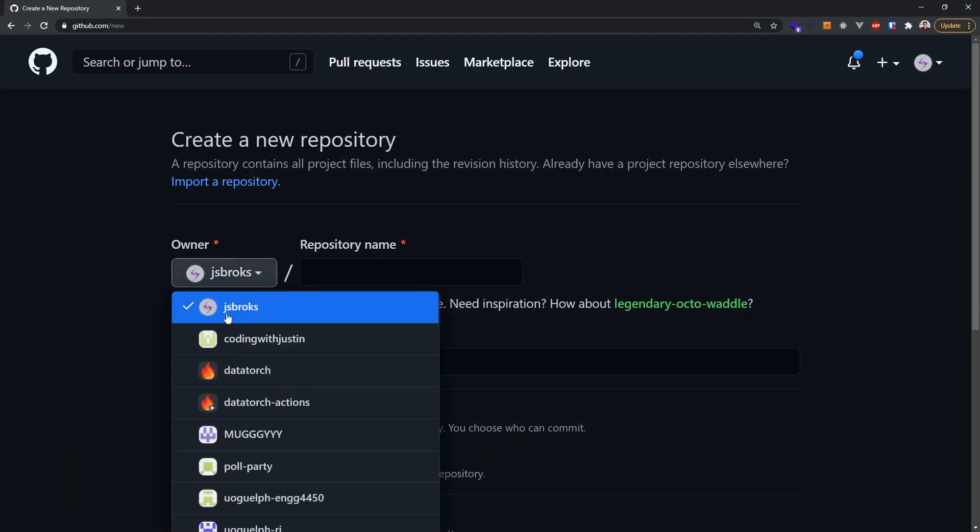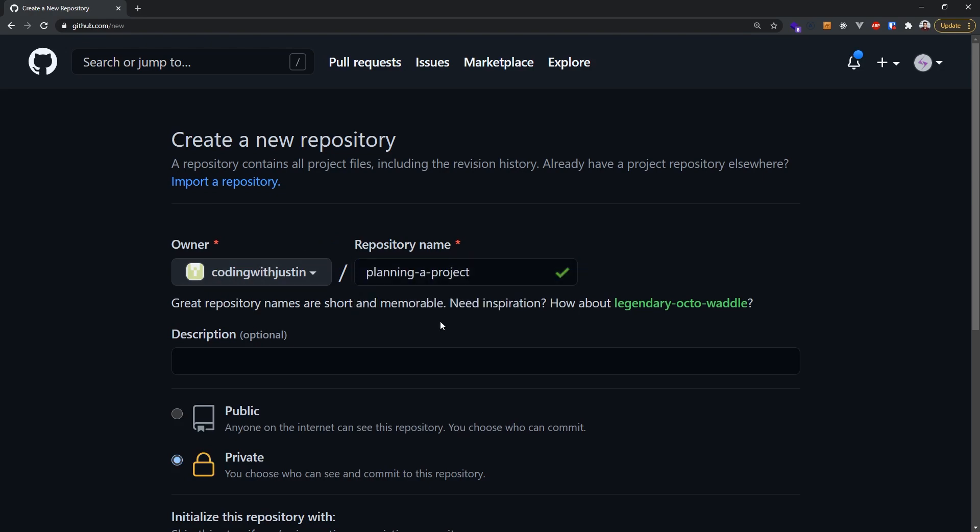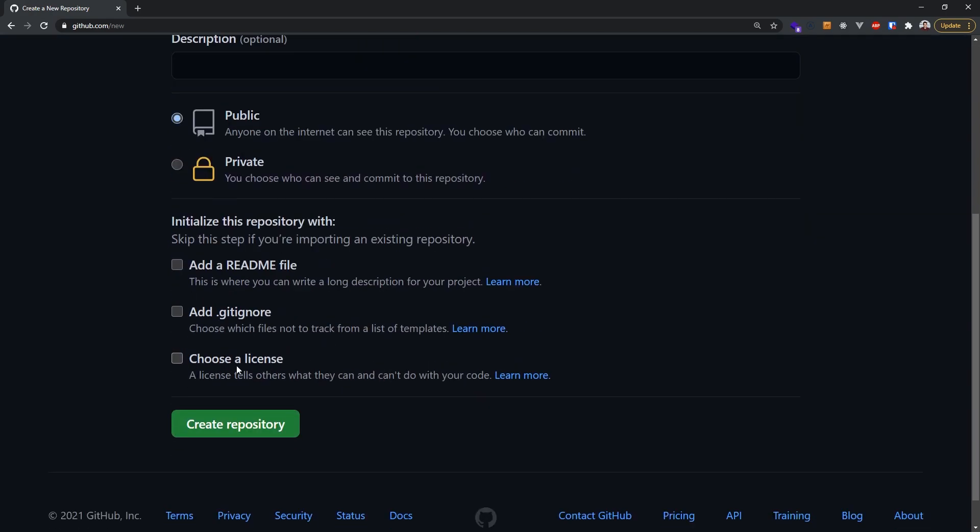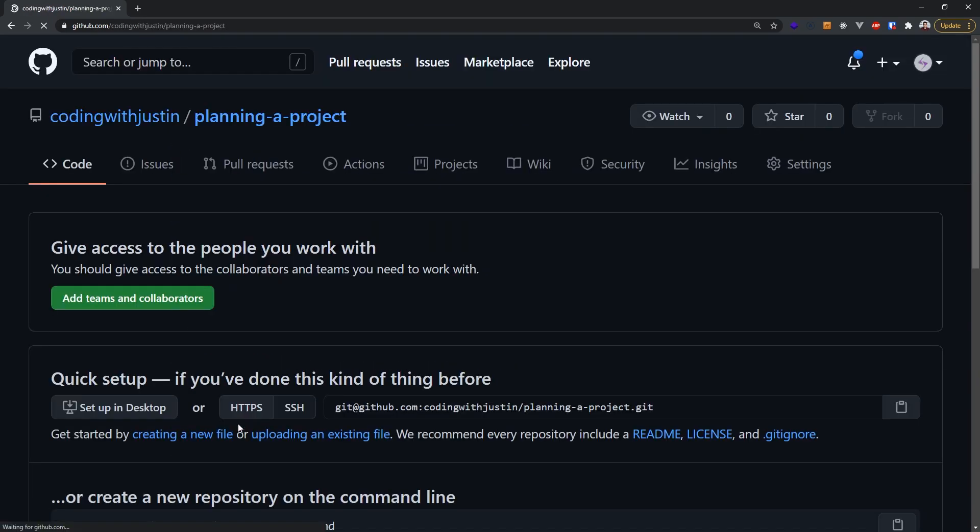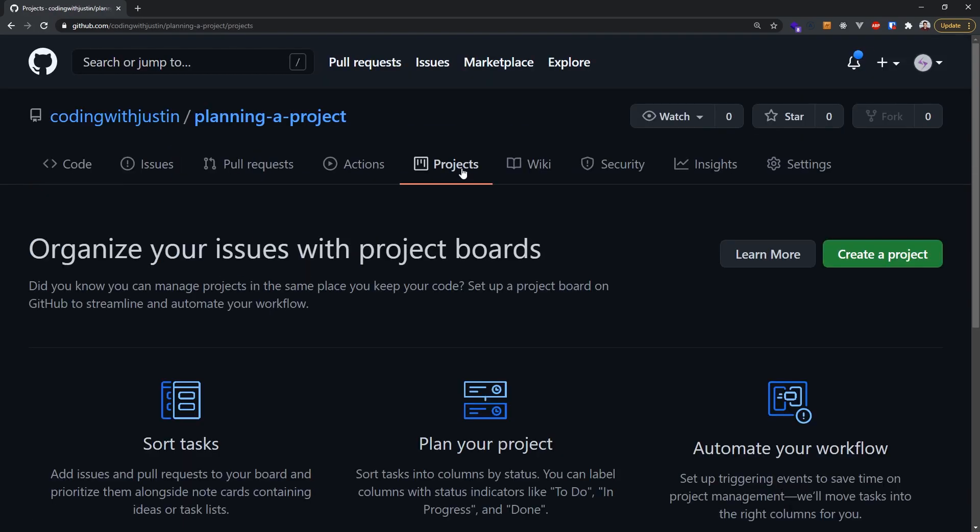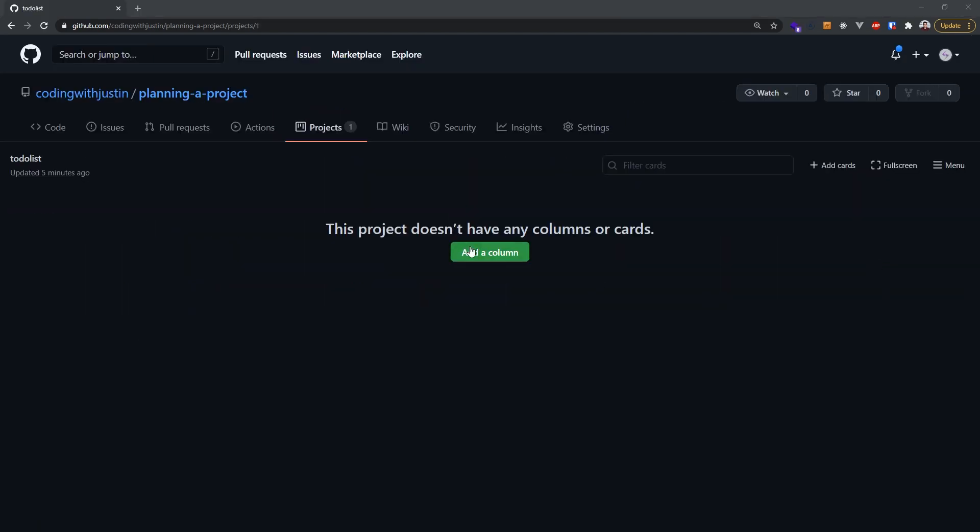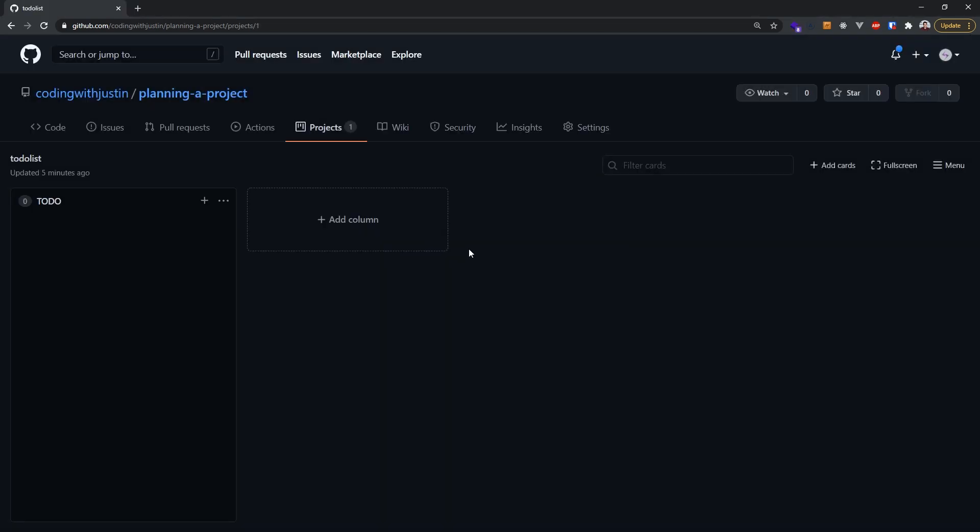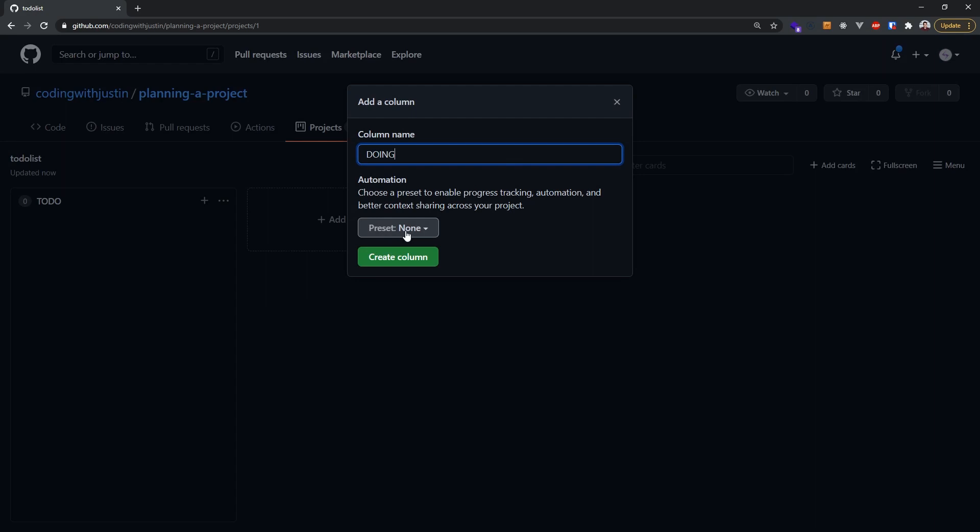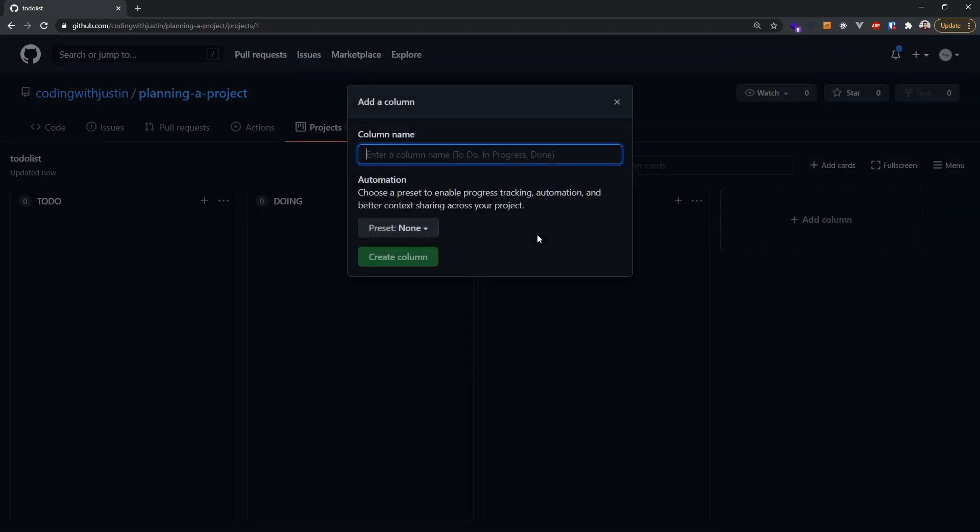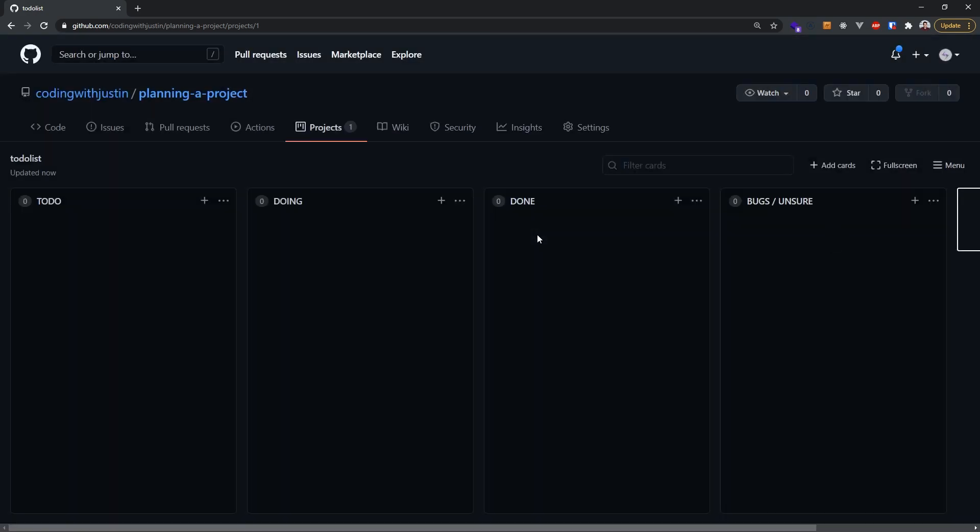First, you'll need to create a new repository on GitHub, then head over to the Projects tab. We'll create a new project, and I'll divide everything up into four columns. In each of these four columns, we can add cards. As we work on the cards, we can move them into doing and once completed into done.